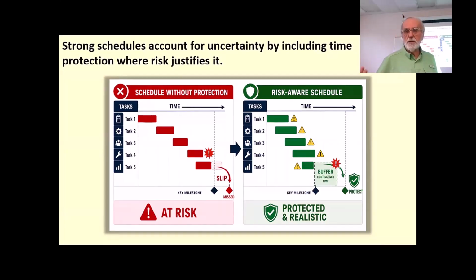The only thing we can't do really is something the tool we have for it's called a workaround. A workaround is essentially what we do if something that we haven't planned for just happens, and we have to take some kind of immediate action. A workaround is essentially a response to an issue. And I don't know if you remember, but the difference between a risk and an issue is a risk is something that has the potential to happen, and an issue is something that's happening. So contingencies are for potential items. Workarounds are for issues, the things that are happening.